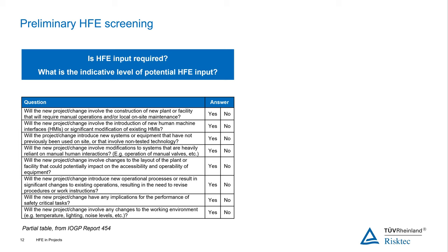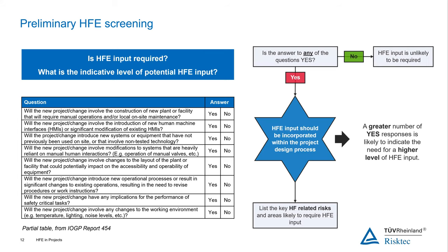So that's going to be a clear one where you say, yeah, okay. And then that would identify you need some HFE input. And so the way you use this screening is you go through these questions, you can say yes or no to help you understand. If you've got no yes answers, then it's unlikely that you'll need any HFE input. But to be honest, for most projects, you'll need some level of input.